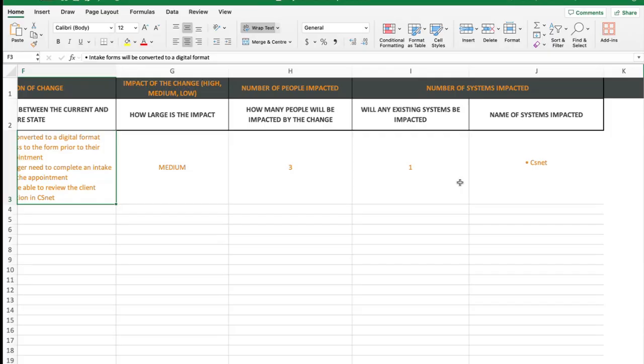Or letting the business know that, by the way, if we change this field and how that data is captured, you're going to also need to pay to change these reports, or you'll need to get someone to change the current application programming interface outside of this project because it's not in our scope, or you may ask them if they want to do a change request and include it within the project scope, and then the project manager would organise for it to be done.